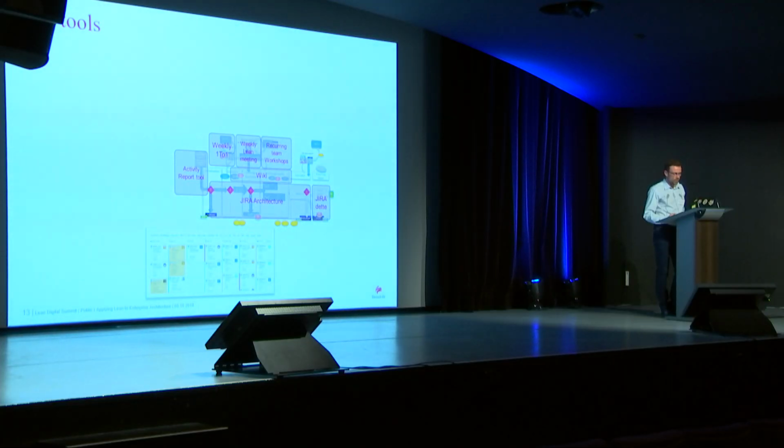The one-to-one gives us the opportunity to discuss priorities and issues, and sometimes capacity problems. The Lean meeting allows us to share, of course, with the team on what is everyone's actuality, what deliverables are about to be delivered, and who is going to take responsibility for new projects. We also identify problems and log them to trigger the PDCA process.